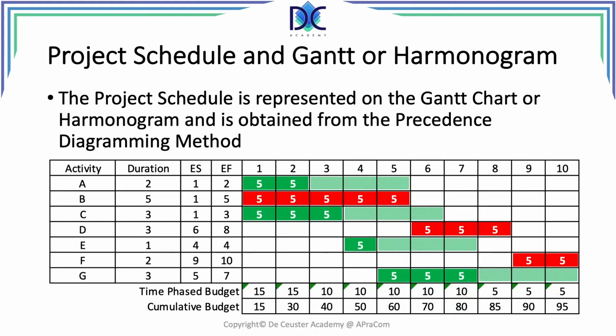Resources should not be working more than 100% of their available time, so we have to reschedule activities. We have to find a combination where all resources are utilized less than 100% of their time. When we resolve this, we find the planned start and finish times of the activities. And that is in fact our project baseline, our cost baseline that we will use during execution.